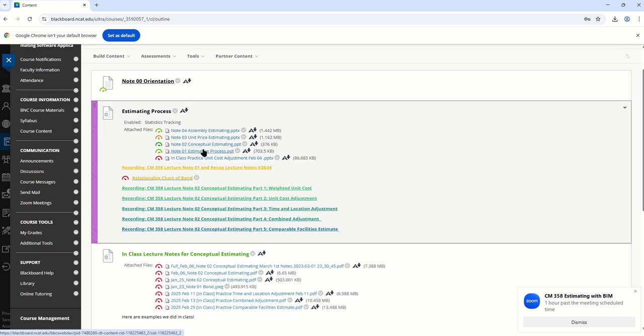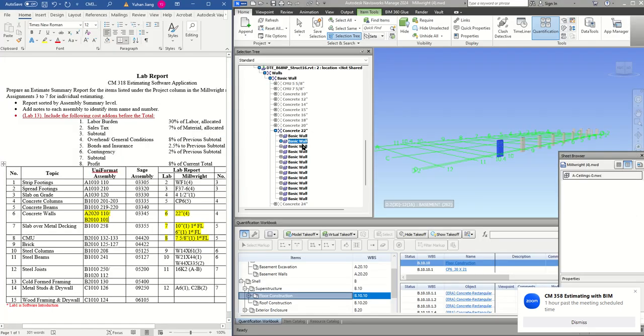So you don't have both of them, you just have the B right now in the work breakdown structure? It really depends on your company's or element's location. If you have it all underneath the basement, you are doing all A, because A is substructure. Oh, sorry, B is shell, A is substructure. If all is in the basement, you're doing the A. If all is above the first floor, you're doing the B.